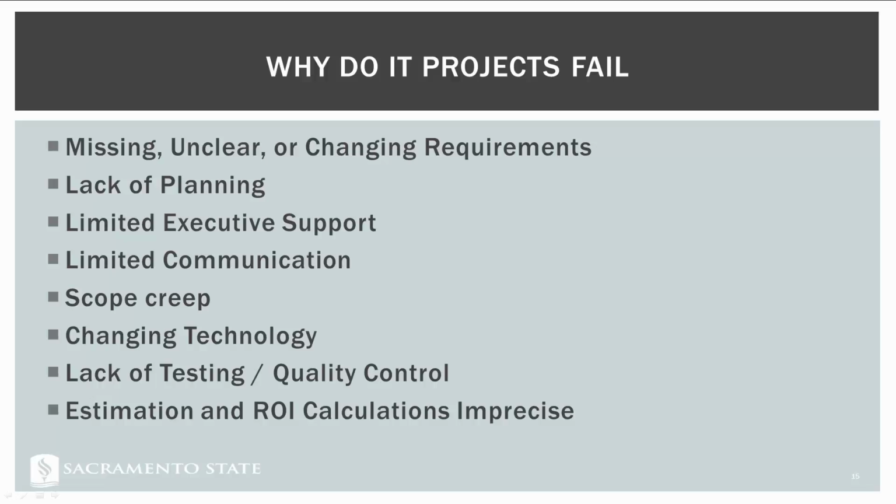It has to do with the idea that you set out to make a particular project, and it has a certain scope. So when you start a project, you figure out the scope, and then you budget for it and plan for it, and you evaluate the time frame for completing that particular project. Scope creep is when that changes over time, and in particular, it grows over time.